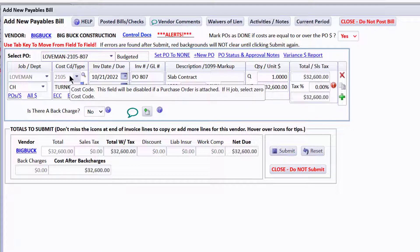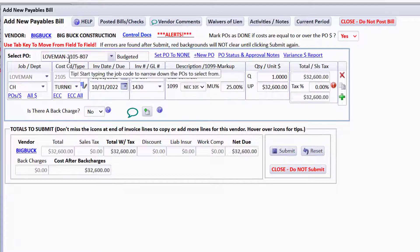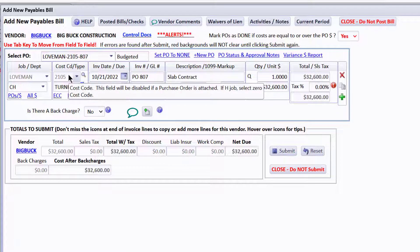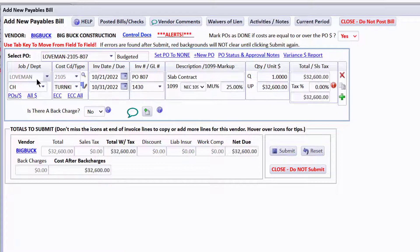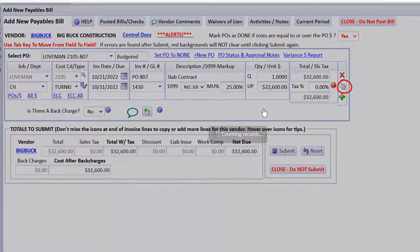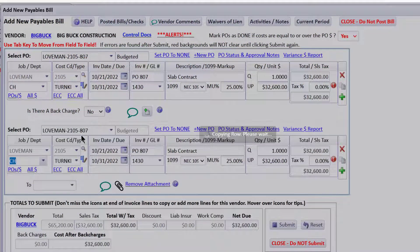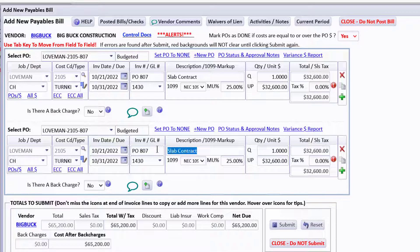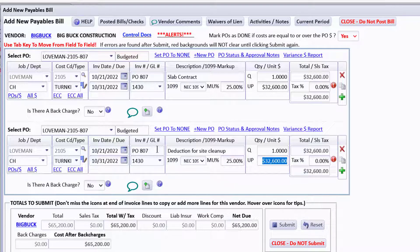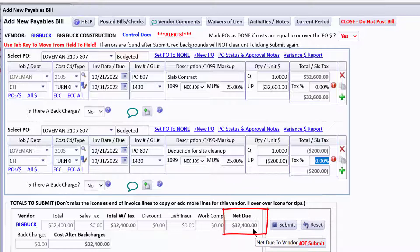Notice how the amount dropped in from the PO. What's cool is if I have POs I don't have to manually code the cost code. Let's do another copy of this line for the deduction — it's the same PO, and we'll write 'deduction for site cleanup' with minus $200. Now our amount has gone down to $32,400.